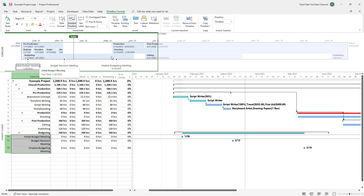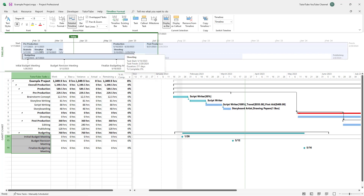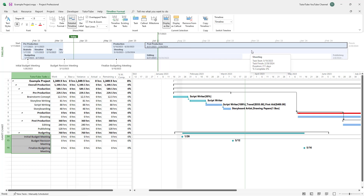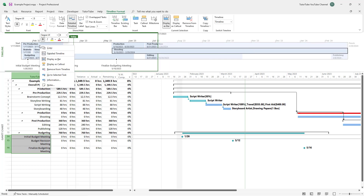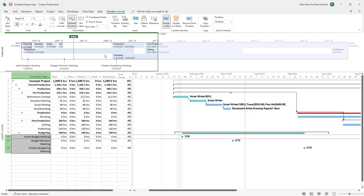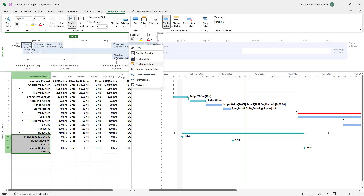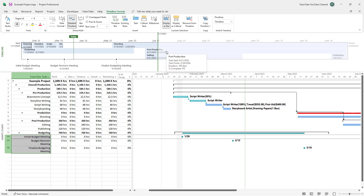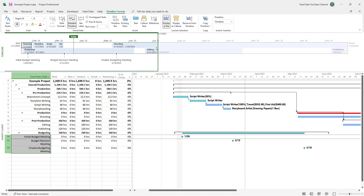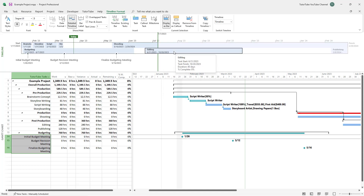That is how you add tasks to the timeline. If you want to remove them — for example, if you don't need the main task because you already have the subtasks — you can right-click and choose 'Remove from Timeline'. You can do the same for Post-Production and any other tasks to remove them from the timeline. That is how you add and remove tasks from the timeline inside Microsoft Project.